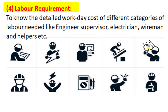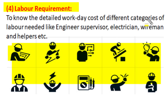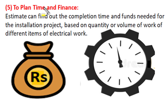To execute any electrical installation, we need manpower. Different types of labor and officials are required — including electrical designer, planner, supervisor, electrician, wireman, and helpers. A team is formed of different categories of people needed for electrical installation, and required workdays are calculated to find out the cost of the labor component in the electrical installation.